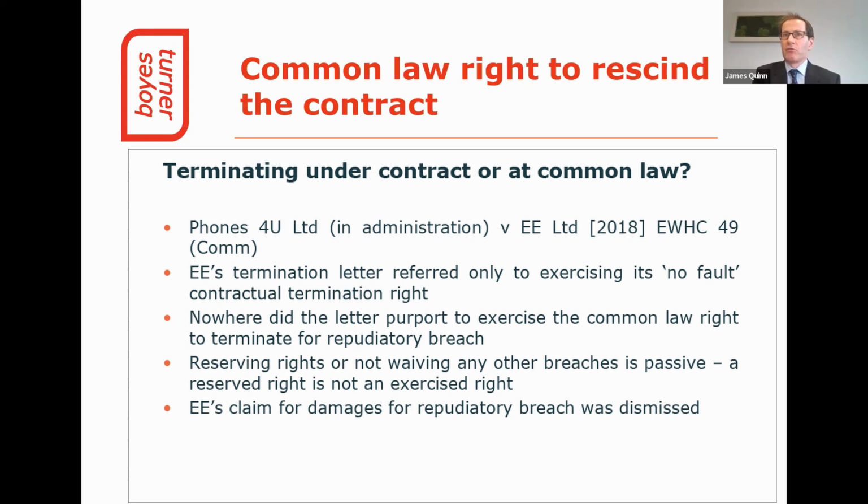The judge found that reserving rights or not waiving any other breaches is passive, and that a reserved right is not an exercised right. In essence, EE did not terminate the contract for repudiatory breach. The contract had already been brought to an end before EE purported to accept a breach of the trading agreements as giving rise to their loss of bargain damages claim. It was therefore not entitled to claim loss of bargain damages, and its claim to do so was defeated by